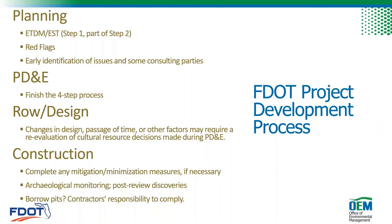During construction we should be completing any minimization or mitigation strategies if the project has an adverse effect — this can include archaeological monitoring of construction activities or many other things. Some MOA stipulations may not be completed until after construction and that is acceptable. One other note: if a contractor wants to use a borrow pit during construction, it is their responsibility to seek DHR clearance for that activity, not ours and not Turnpike's.